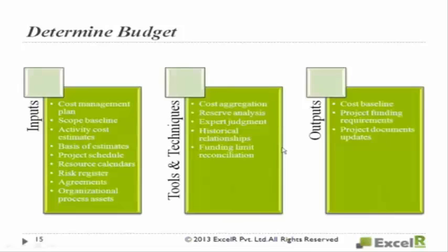Project schedule you may need. Project schedule contains the milestones, the control accounts information, all those things. Resource calendars you may need. Resource calendars show which resources are assigned to which project, and at what time they are assigned. This will indicate cost for the duration.